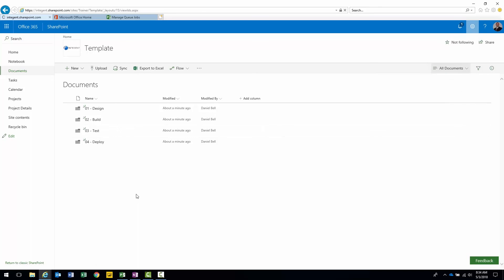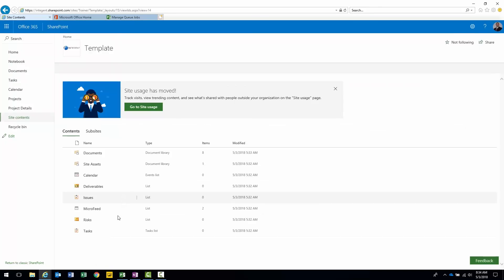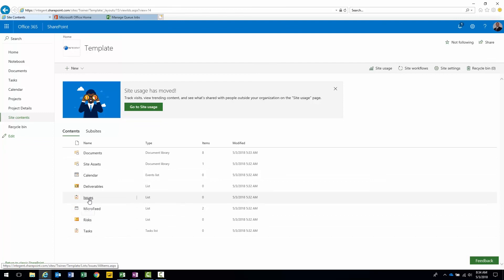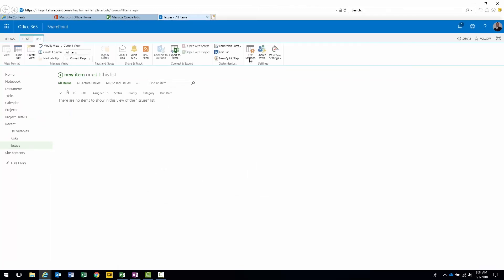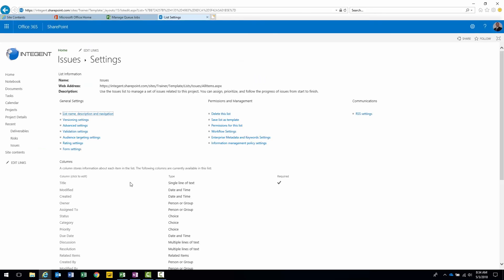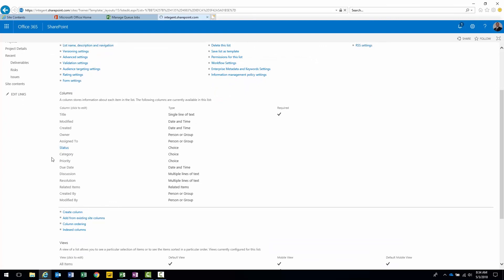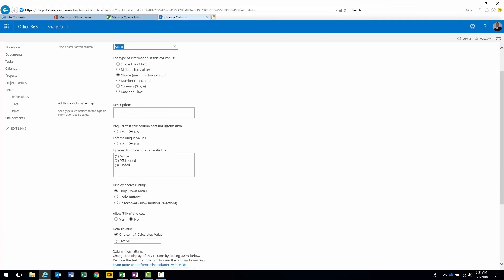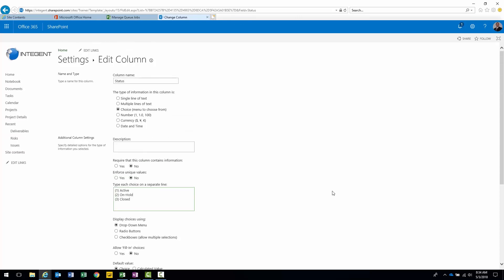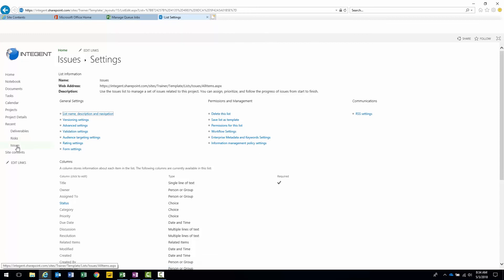Let's take one more look here. Check out our site contents in this particular list. There's our issue list and risk list. One more slight modification we're going to make here is to the issue list. I'm going to go into list settings, advanced settings. And then one of the items here is going to be status. Active, postpone, closed. And we're just going to put active, and this customer wanted active, on hold, closed. So very simple change to status. Click OK.